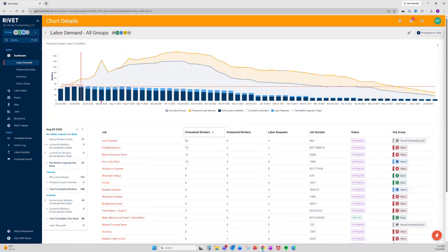To reiterate, this is a huge benefit for auto forecasting your baseline, because this helps PMs and project managers or anyone who needs to update labor plans by eliminating that manual effort for creating a forecast for every single individual new job. Now everyone could just jump right into the job and begin adjusting the forecast. Also, an additional benefit is that schedulers don't need to wait on this step because they could come right into the job and begin scheduling.